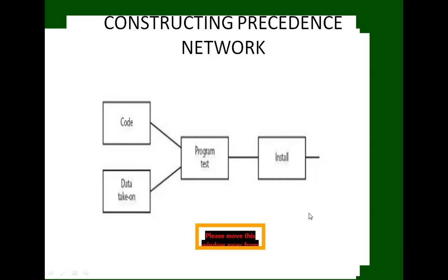A project network should have only one start node. If the project starts with more than one activity, then add a start activity with zero duration. A project network should also have only one end node. The end node designates the completion of the project, and the project finishes only once there is one end node. If there is an end node, the project is completed.